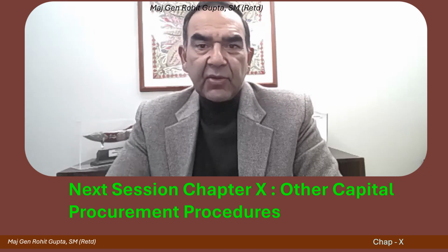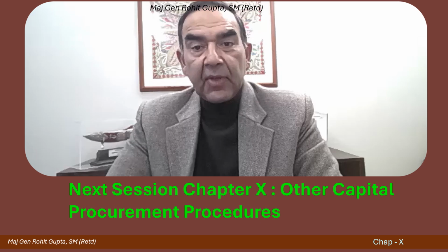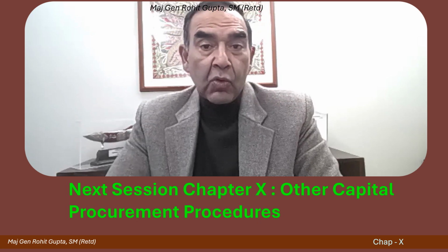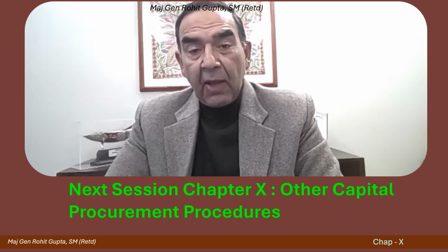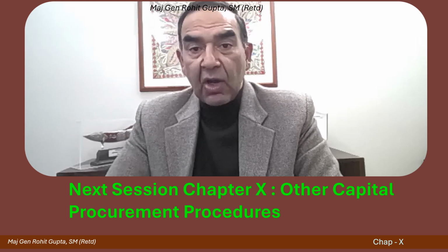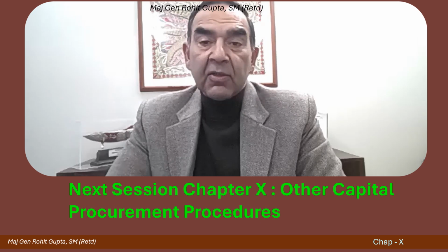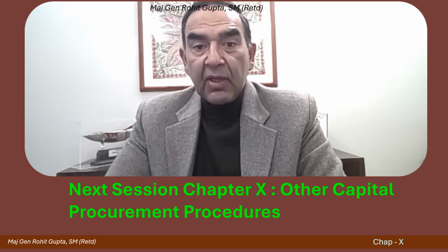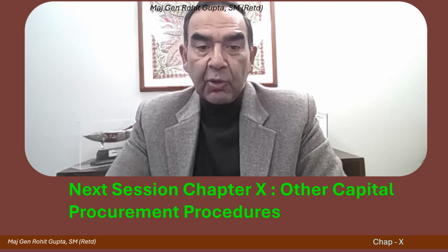That is all for the fast track procedure, the basic issues about it. We can speed up the procurement. However, please note, as per the DAP provision, unless they are amended, these are only meant for critical equipment which are wanted at a time of crisis, operational necessity, and not for normal procurement. Therefore, carrying out procurement under the provisions of DAP is not allowed under this chapter unless it is for the purpose of crisis or immediate emergent capability building, unlike what people think it to be.